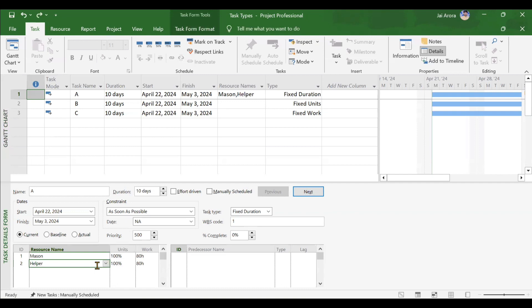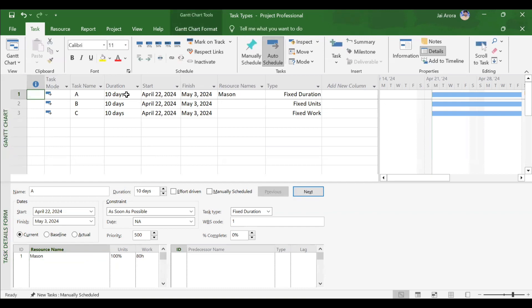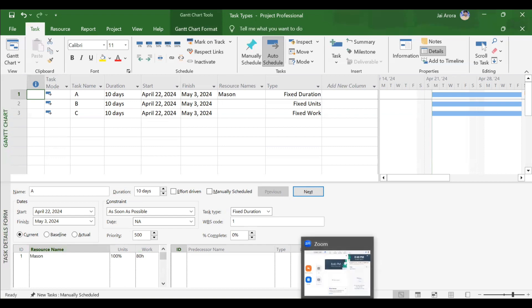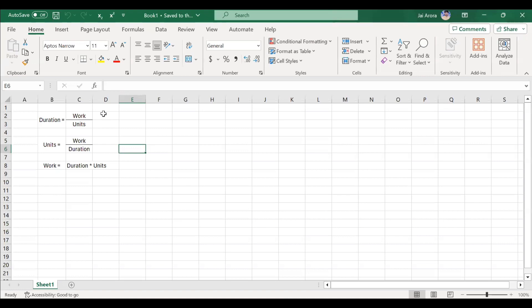Third case for fixed duration: pressing Ctrl+Z and instead of increasing units, the duration is changed. An important note: MSP is very loyal — it will not change the number of units automatically. Only the user can change units. If duration is doubled to 20 days (160 hours) with units still at 1, work will simply double. Making it 20 days confirms work becomes 160 hours.